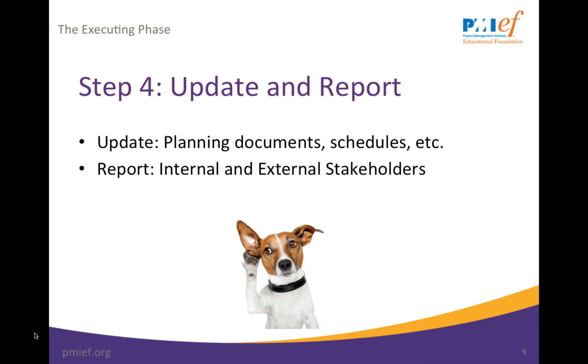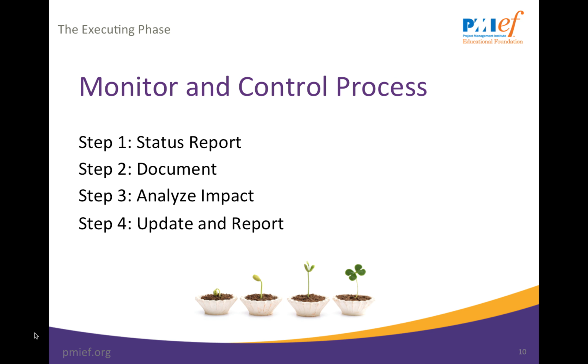Will any deliverables change? During this revision, it is key to review the scope of the project to ensure that it is not changed. If the scope has changed, then what other changes must be made in the schedule or resources to accommodate that? These are all really good questions to ask. Assess the information, make new action items if needed, revise the project plan, and report out to the team and stakeholders. The project manager leads all of these activities. Again, monitor and control is the 4th step in this cycle.